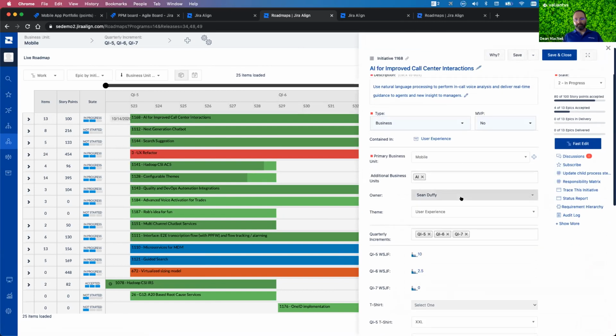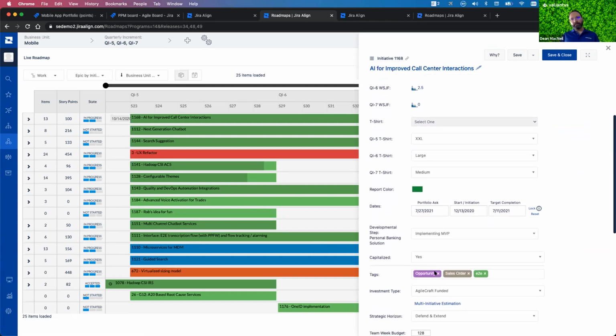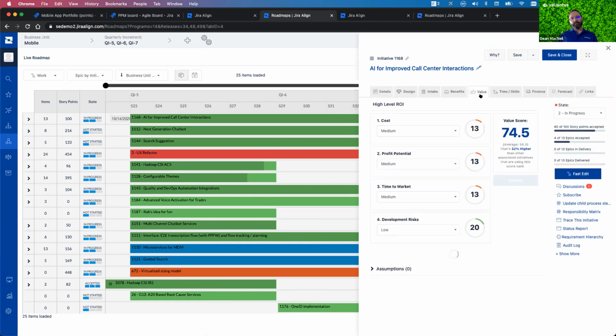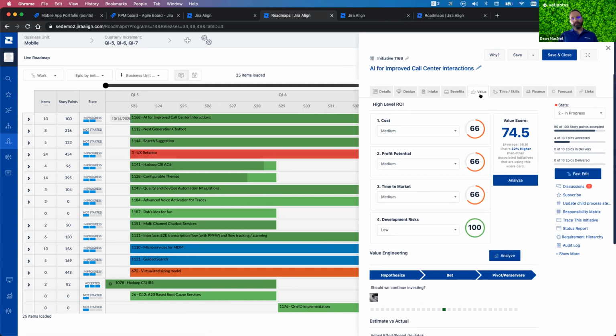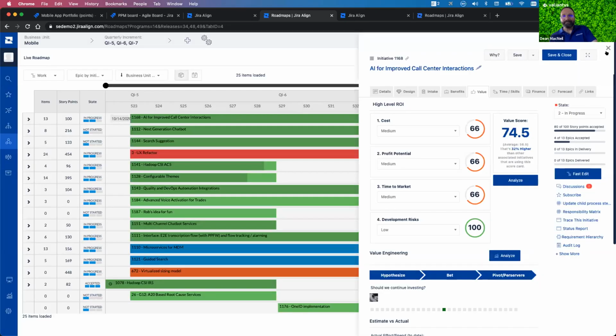Yeah, and you have a lot of different ways to visualize information and estimate in Jira Align, depending on the framework that you choose, and how you want to prioritize and estimate those different layers. At the story level, it is the story point, of course, but at the initiative layer, for example, you have different ways of prioritizing. That can be as simple as a quick overview, a strategic score and high-level estimate of effort, or much more complex if you want to assess the value of different initiatives based on your own scorecards, to have that level of priority and understand how you're going to manage that backlog. Jira Align allows you to create those different scorecards and actually compare this against other initiatives within the same realm that compete for the same people, money, and time as this specific initiative. So that's a very key element that Align brings to the table in a much more advanced way than anything you could do in Jira, pretty much.